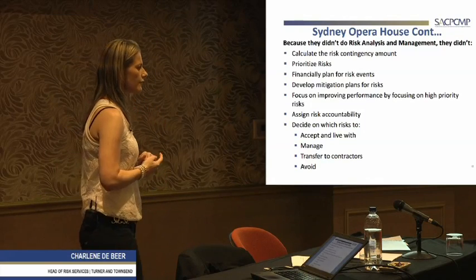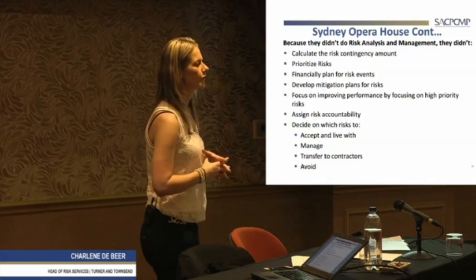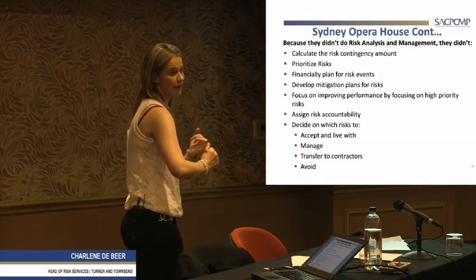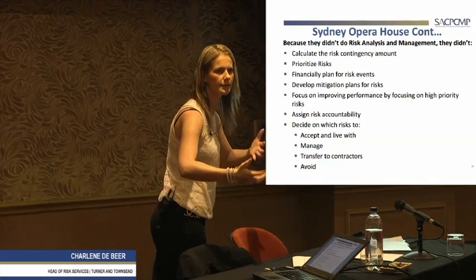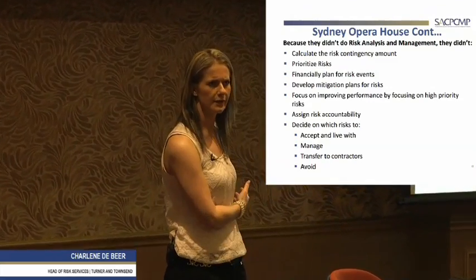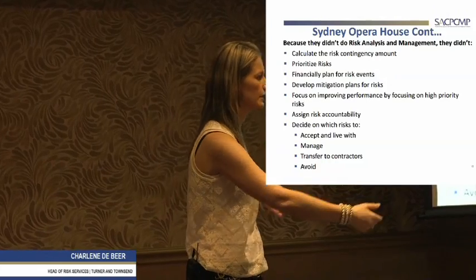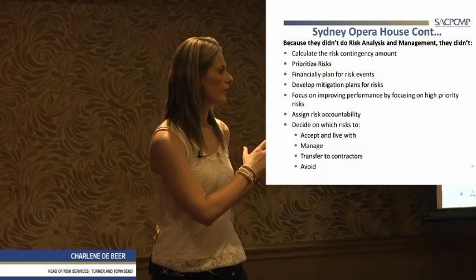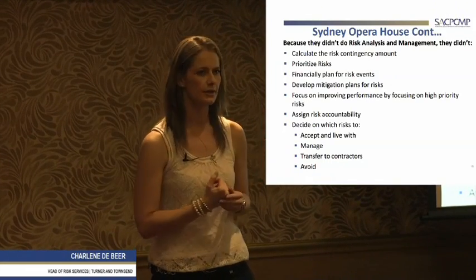Now, if you have risk contingency, you could do a few things. You can buy out a production line. So you can go to the guys in Italy and say, look, we're pressed for time. We don't have 40 weeks. We actually only have 36 weeks in our schedule left. We must still install the valves, etc. So can we buy out the production line?